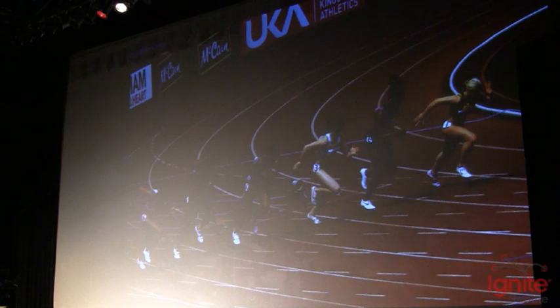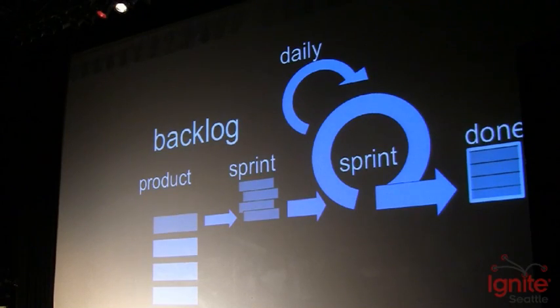Basically a Scrum project is divided into a number of sprints. At the beginning of each sprint you take things off the product backlog, break them into little pieces, and put them onto the sprint backlog where you work through them. A sprint in Scrum is typically 30 days and most sprints are the same length. In wedding planning Scrum you can have sprints any length you like — perhaps 10 days, two weeks, a month, or 45 days.